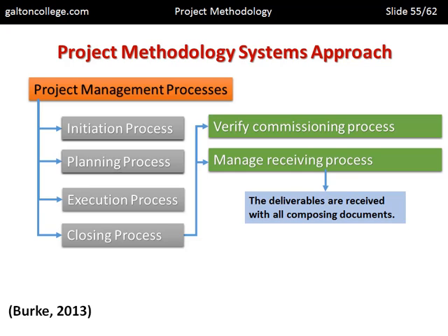Manage receivable process. Well, deliverables are received with all composing documents. So the outputs are received by the department that commissioned it, or by the customers who commissioned it, and now it's passed over and all of the documents are in a sense signed off. There is now knowledge about what is required with this project, how it should be done, how it should be completed, and the customer's reaction to the project should be sought and also documented so that improvements and refinements can be made to the documents in the event of the project being performed again in the future.